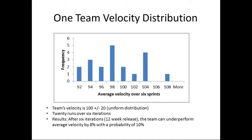The question is, how bad can it get? Monte Carlo shows there is a 10% chance we will be 8% below. Reading the chart: at 92 points, 2 out of 20 examples result in an average velocity of 92. Two out of 20 is 10% — that's where we get the probability. And 92 is 8% less than 100. So we go to the product owner and say there's a 10% chance we're going to miss scope by 8% — the bottom 8% of the backlog is not going to get done.